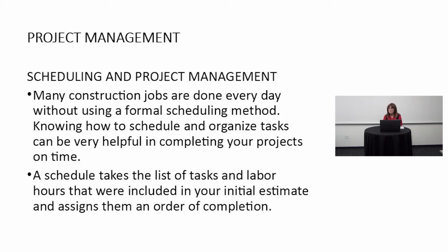Scheduling and project management. Many construction jobs are done every day without using a formal scheduling method. Do we know that? Knowing how to schedule and organize tasks can be very helpful in completing your projects on time. A schedule takes the list of tasks and labor hours that were included in your initial estimate and assigns them an order of completion.